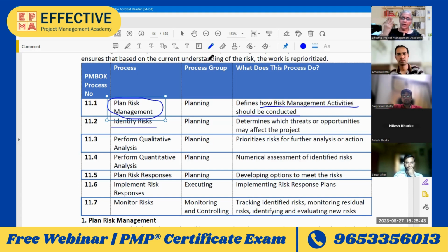Impact of the risk and probability of the risk. All of that if they are known. If that's not known, you just add that when you come to know it. So it's a living document, and constantly you have to ensure that it is updated. Any information that you get about a certain risk needs to be updated immediately. So it has to have the latest information so that you can plan really well.